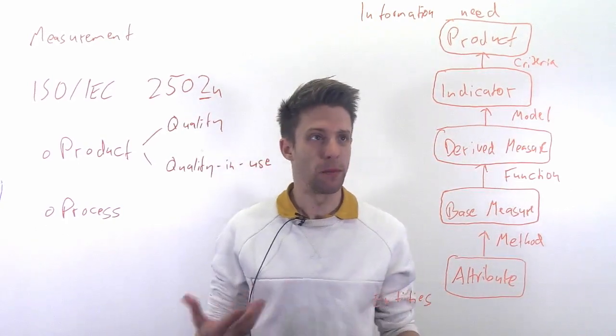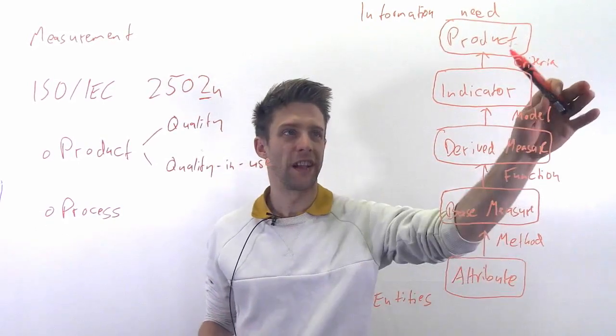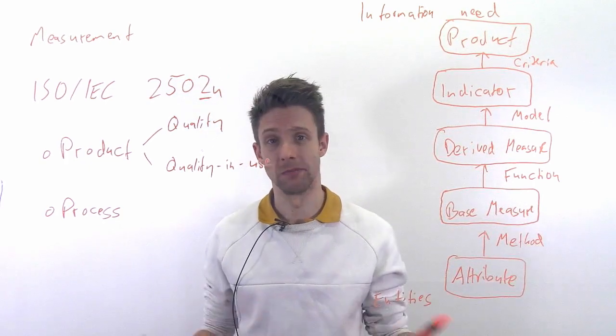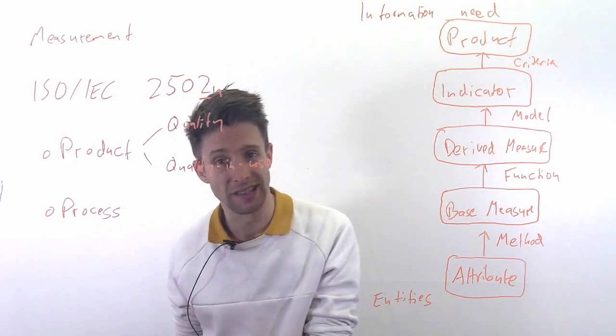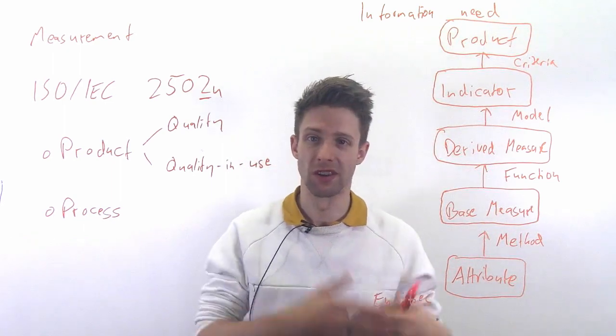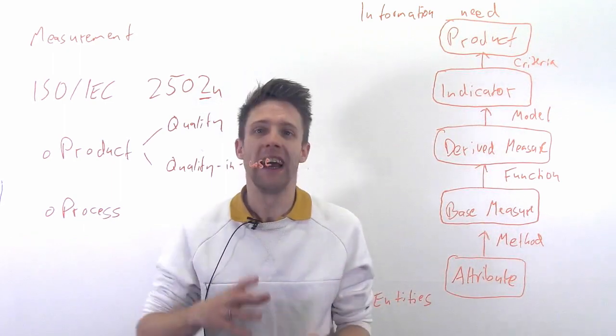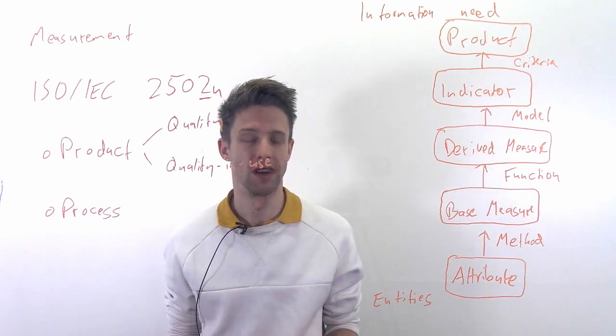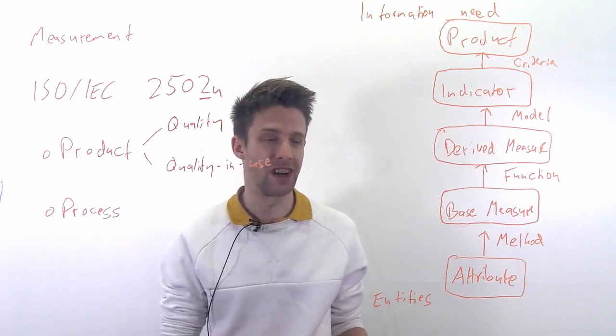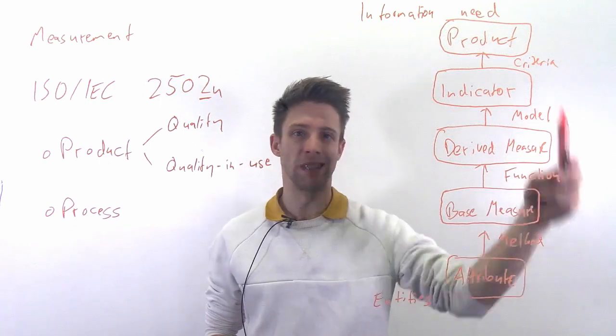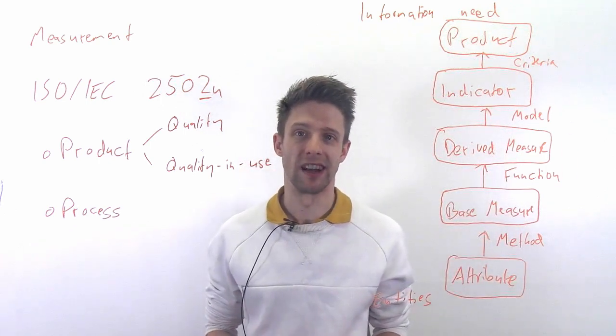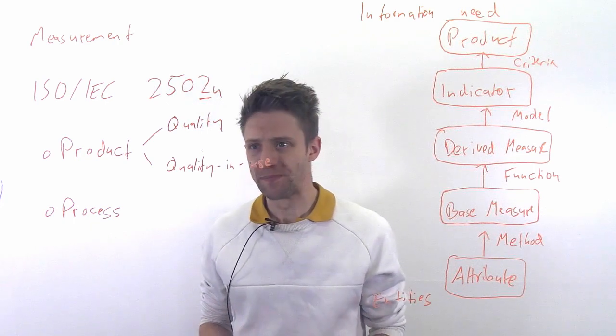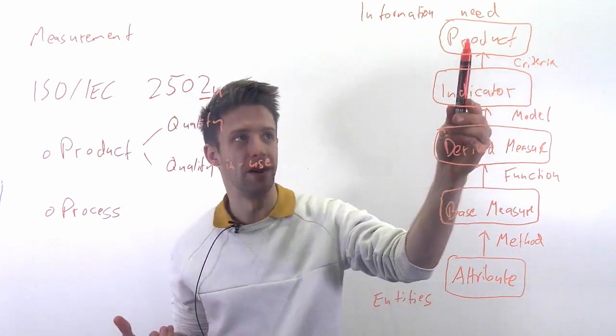And that's then something you can give to the scrum master and say, well look at this, our software quality, the amount of bugs we have, is red right now, we need to do something. So usually that's really when you get to something that is useful. Now just to make this complete, we have attributes, we want to measure them in a base measure, and we need to have some kind of method of measuring them - for example, counting the lines in a source code, counting the amount of bugs in the bug reporting system in the last five days.